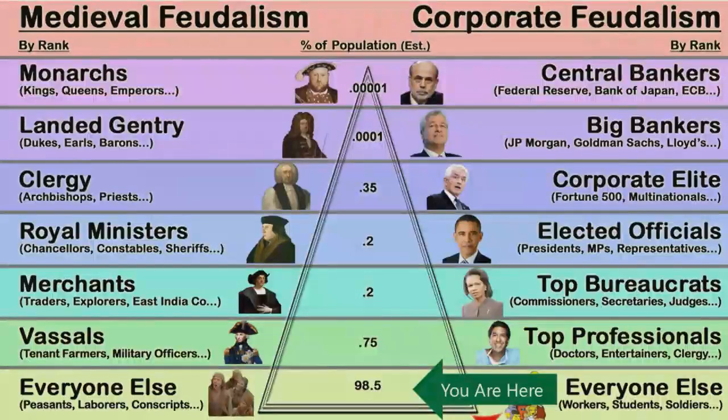But you don't have to be, because what I end up seeing a lot of times with our clients is that you can go to finance, and they'll give you a blended rate for a type of person. Somebody in this role typically makes this, as a median. And if you factor in your overhead costs and all that sort of thing, it's really difficult to reverse engineer that back to see what any particular individual makes. So there could be some hurdles as far as people being afraid to put those sorts of things into their projects, but if you do it right, there's really nothing to worry about.